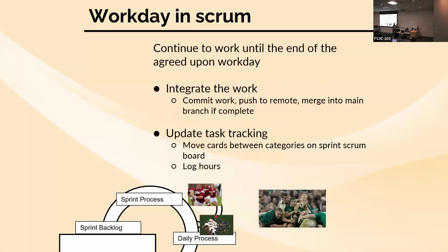And then at the end of every day, we make sure that we integrate our work. So you want to always commit your work at least once a day on your project. Push to the remote as long as it's not going to cause you any main issues. I'll talk to you about that next lecture about how to do a Git workflow to make sure that you avoid issues when you're pushing up to the remote branch. But for the moment, at least, make sure you commit your work at least once every work day to track your workload during that process, but also update your task tracking.